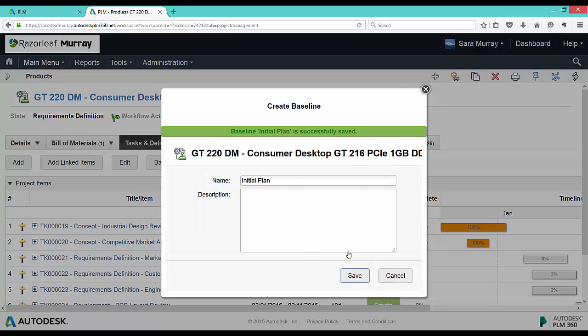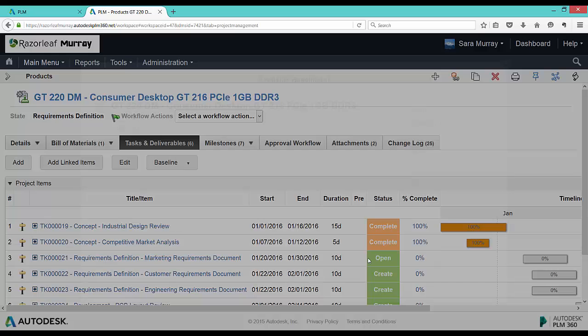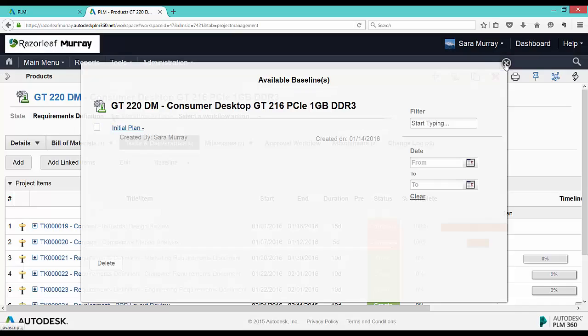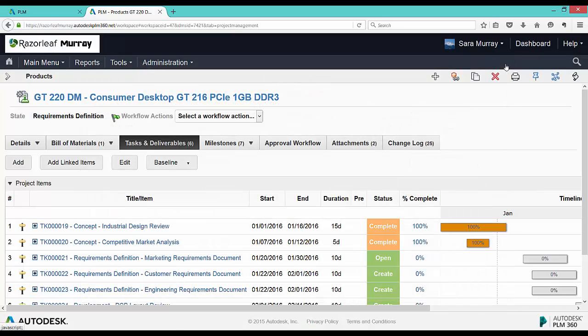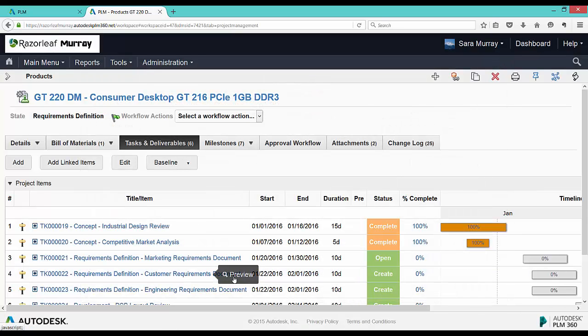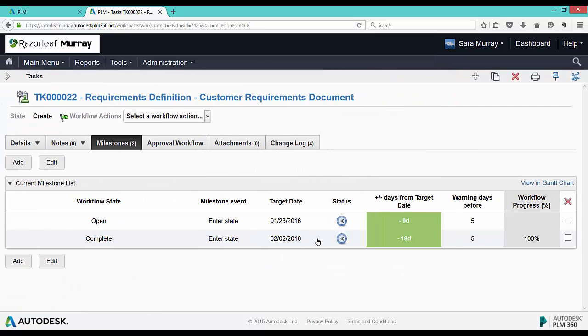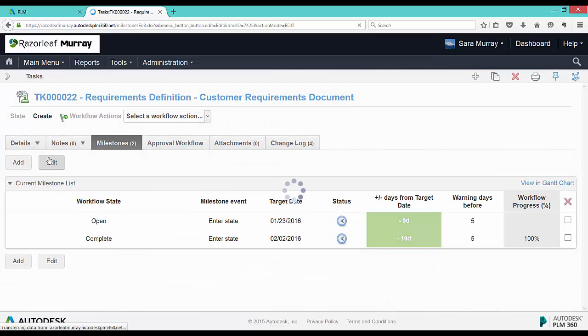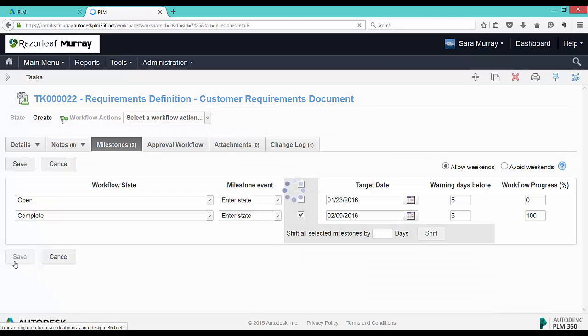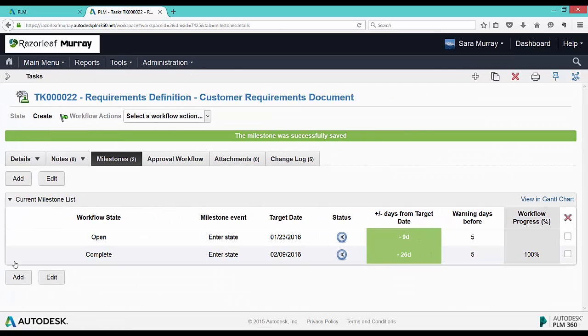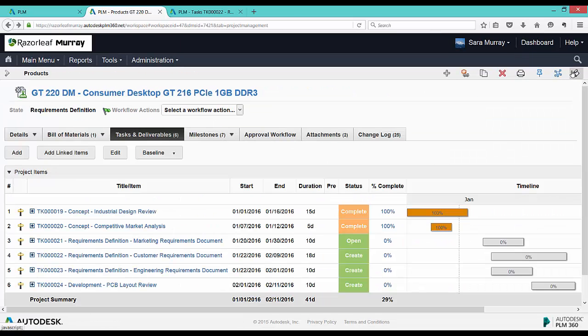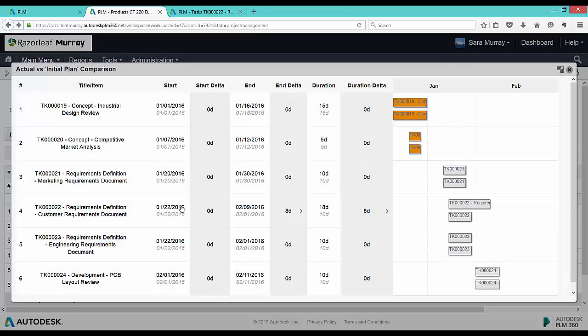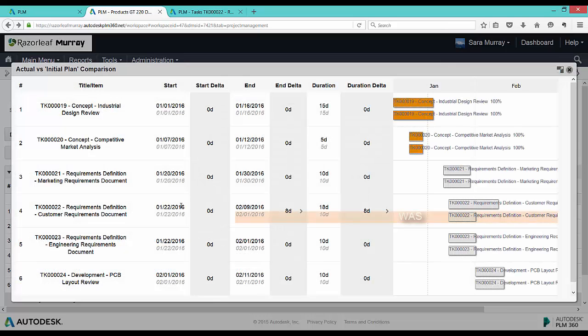Then, we find out that the customer requirements document isn't expected to be completed for another week for whatever reason. So, we'll change the target date for the complete milestone of that task. Now we see that change of dates reflected in project management, and we can also view the delta between the baseline and the actual.